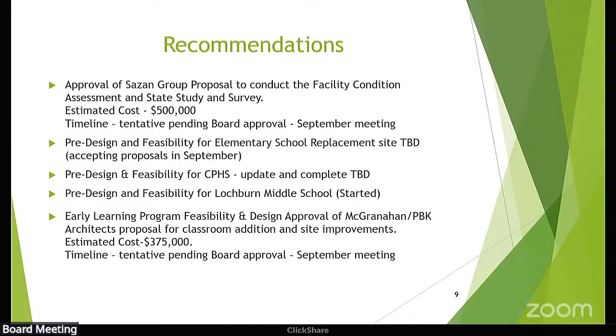I'll add to that a little bit in the sense that when those become emergency repairs, you pay a premium price for emergency repairs. And they had to be done over a winter break, so we were paying prevailing wages at overtime. And we were paying premium costs because the bidders are minimal at that point in time. So anytime you get in that situation, you're going to pay a premium price, and you're only going to get the minimal amount of work done that you can get done. There was no system fixed there. It was just, again, we added to the archaeological dig. We added another layer of repair to it.